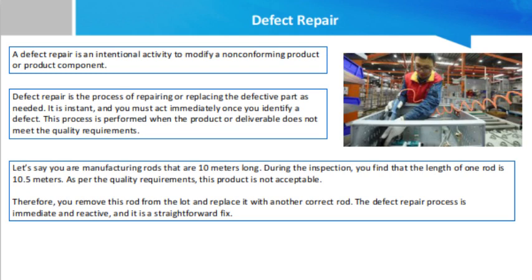In project management, change requests may involve preventive actions, corrective actions, and defect repair. However, in scope changes, you may update the project scope, baseline schedule, and baseline budget. Preventive actions, corrective actions, and defect repair should not be used to justify a baseline change.